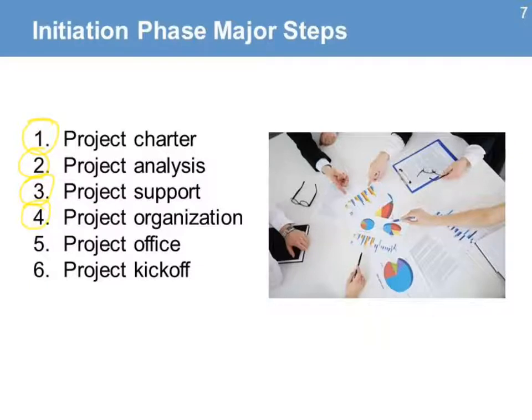The next step is the organizing of the project team. That means all the roles and responsibilities of all people involved in the project. The next step, the project office, is setting up the project environment where the project team will work. And the final step is the project kickoff. These are the basic steps that the project manager should accomplish in the initiation phase.